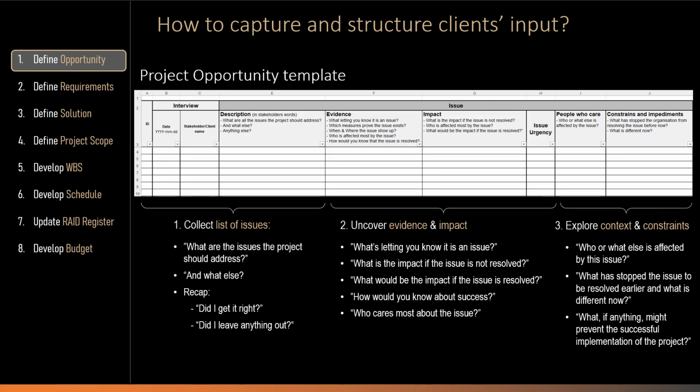Once the interviews are completed and the worksheet has been filled in, the next step is to analyze the data. The analysis should help understand which issues are most important from the client's perspective, how urgent they are, and whether they are realistic for the project to address. This analysis should help the project manager and the project owner have a focused discussion about what the project should address and, as importantly, what it should not address.